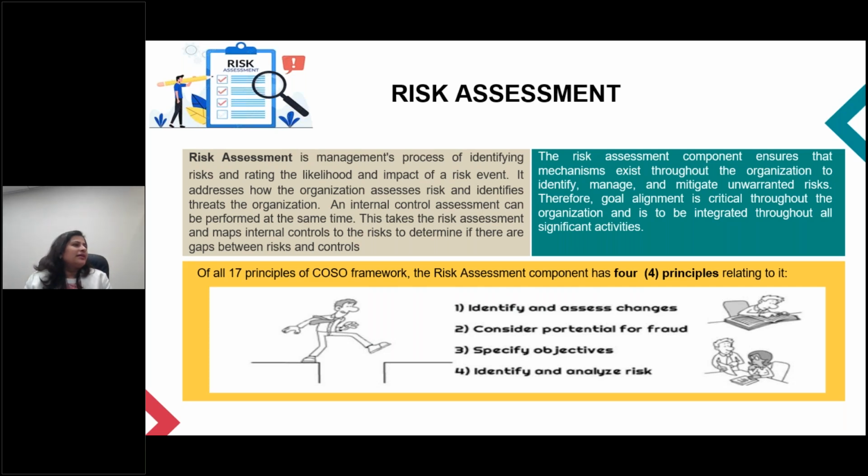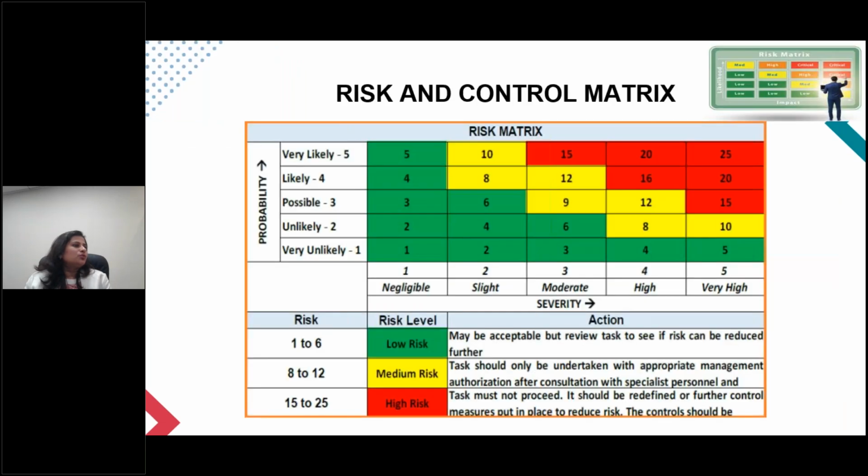So we talked about heat map earlier. So I just want to show you all quickly what a heat map looks like. So it's actually your green, yellow, or amber and red. It's two-dimensional. You could have further dimensions, a more complicated risk map as well. Why the heat? So red is your danger, right? Red signifies danger. That's your higher risk. So the chances of occurrence are very high. The severity could be also very high. That's all your red zone.